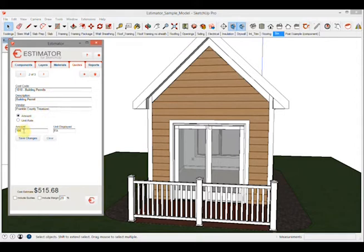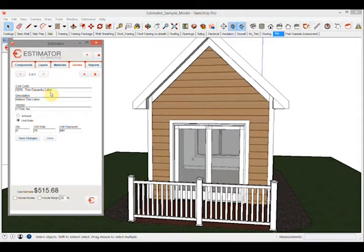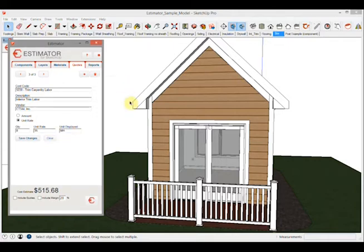Then we can do something by the hour for trim labor. You can come in and choose unit rate, put in your quantity and your unit rate and your units of man hours or whatever you want to use for units displayed. So that in theory when you're done with the whole model you can select everything that you want priced.